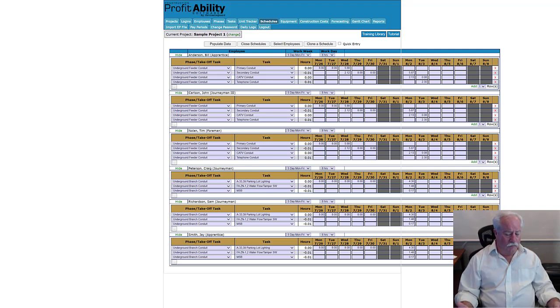Now, I'm currently working on a project. I was actually hired to manage a different project, but I was invited to this project to kind of learn the contractor's means and methods. So I'm observing. Because the ground here is so bad, the cables, it's a solar site, so there's MV cables and there's DC cables, but those cables have to be bedded in sand. Can't use the native soil. We can't process it into something that's suitable for backfill. So we have to bring in sand to bed the cables.